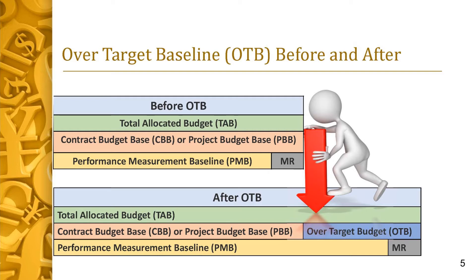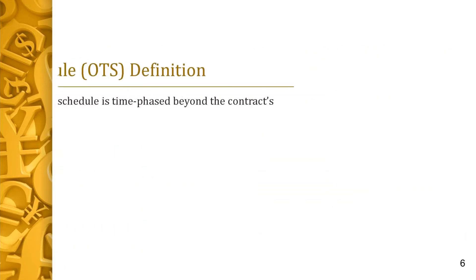As stated in the Change Control Guide, DOE G 413.3-20, the contracting officer would only need to issue a cost growth modification to obligate additional funding without adjusting work scope. These modifications are for funding only and do not change the original performance measurement budget. However, in situations when contract changes are resulting from both additional scope and cost overrun, the contract modifications should clearly delineate the cost and schedule associated with each category of change, as the government is responsible for additional scope, but the contractor is responsible for cost overruns.